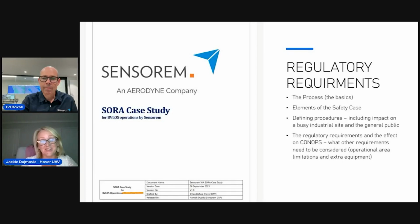And you might start going through this safety case and go, this is not going to work. Or, you know what, it can work, but there are a lot of regulatory requirements, and from around the world, it might be a longer process. So sometimes the harder it is, it might be a year wait, or you need to get third-party certification, or there are different components. Also, you might need additional equipment, so the cost goes up.